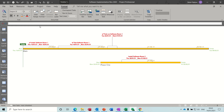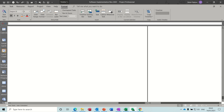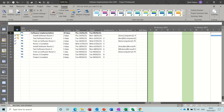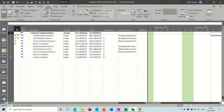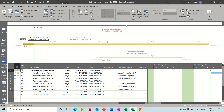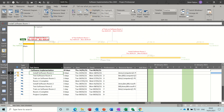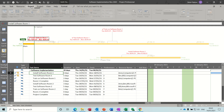That's not great, so I'll undo that. If I go back to the Gantt chart, that's the timeline done. Go to View and activate the timeline on the Gantt chart — you now get it displayed at the top. Then if I go to Reports, I've got a custom report called 'Steve One' where you can see the timeline together with a report.